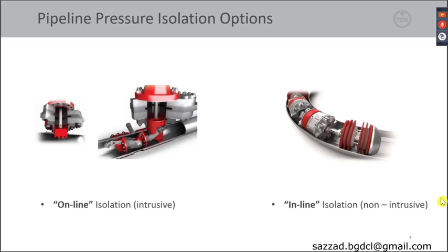However, there was one issue. Since the emergency shutdown valve, the ESDV on the Tongxiao was leaking, the pig trap was pressurized. So the quick opening closure could not be opened safely, and we had to use both technologies.